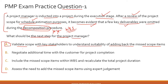Option B says: negotiate additional time with the customer for project completion. This is incorrect. You have identified a few key deliverables which were omitted — that is good — but you cannot go ahead and start negotiating an additional timeline with the customer, because the first question the customer will ask you is: how much more time do you need? And you don't have that answer because you have not done the assessment yet. On what basis will you approach the customer to ask for an extension of the deadline? That doesn't make sense, so option B is definitely incorrect.